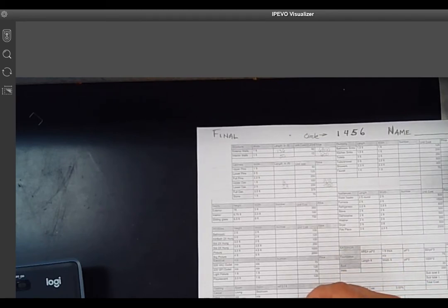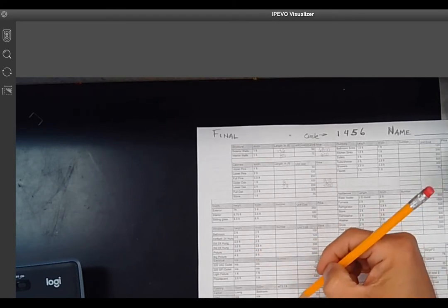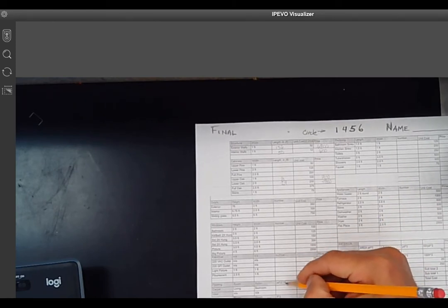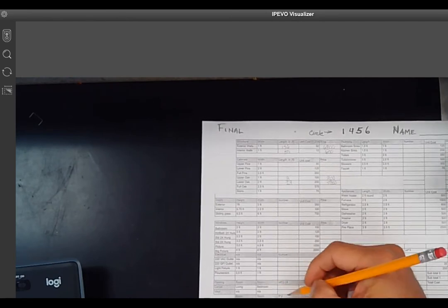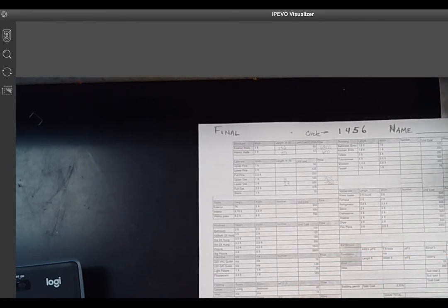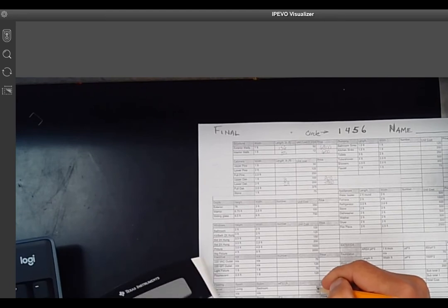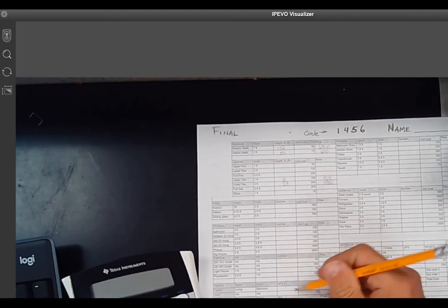This is supposed to be 10 feet, $10 and $15 a square foot. Now, these are sold by the square foot. Carpet and vinyl is sold by the square yard. So when you get your number from the sheet, you're going to divide this one by 9 and then put it in. And we'll show you how to do that real quick. And then we'll do that.